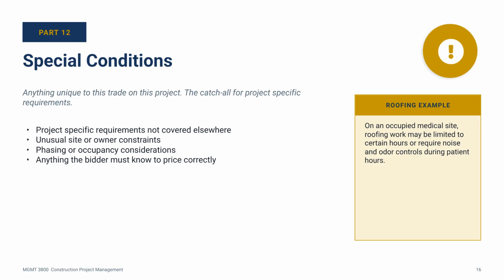Part 12, special conditions. This is the catch-all. Anything unique to this trade on this project that does not fit anywhere else. The example on the slide is a real one. If you are doing roofing work on an occupied medical site, you may be limited to certain hours so you do not disturb patient care. You may have noise restrictions. You may have odor controls because some adhesives give off fumes that cannot drift into the building.